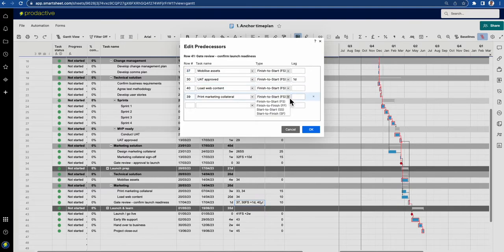Types of predecessors: you've got finish-to-start, which means the previous task must have finished for the next one to start; finish-to-finish, so the previous task must have finished for your task to finish; start-to-start; and start-to-finish. I'm not going to go into definitions of these as there are plenty of resources on the web — let's focus on the Smartsheet content.